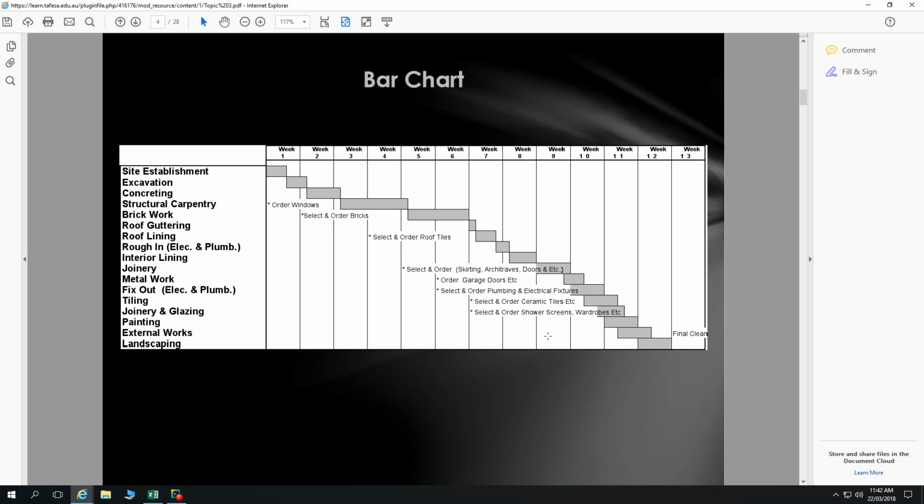Now that's a tight schedule. It is achievable, but obviously if you get a blowout of one of these things, where typically you can't have things happening consecutively, that will draw out, and we should really be allowing around that 16-week period for doing all of this, because we have unforeseen events that happen.